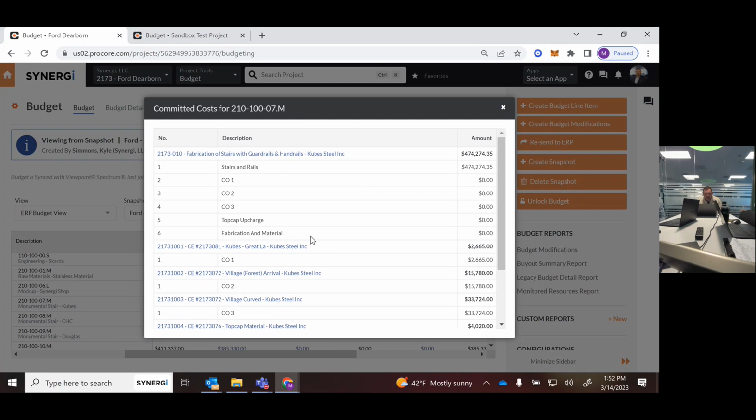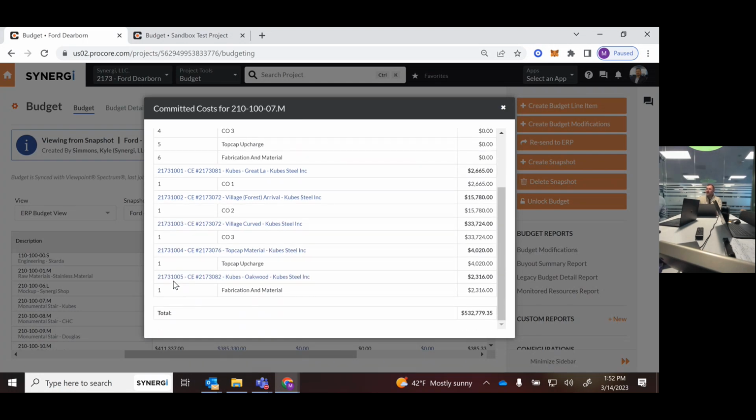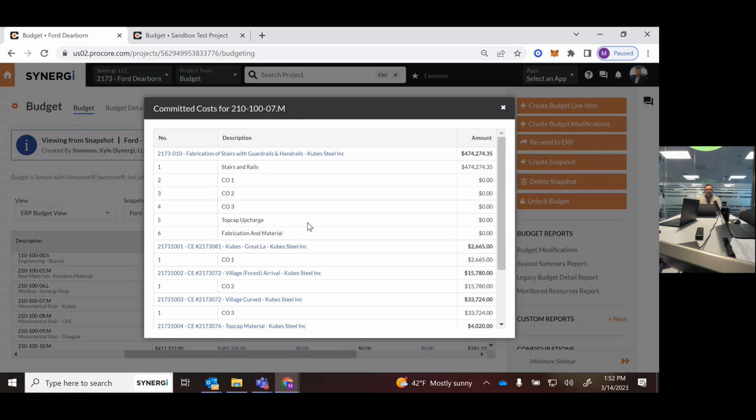Again, looks like, okay, well, these are the change orders here. That was the original contract, and these are all the change orders that have been written in cubes. Is this an instance where it's correct? Yeah, so they would have been commitment 10, change order 1, commitment 10, change order 2, commitment 10, change order 3. So they're following the appropriate numeration that we had talked about. And this was their original schedule of values, that's all. So I'm not sure why those would have been listed as 0 items in their original SOV, but I didn't mind.